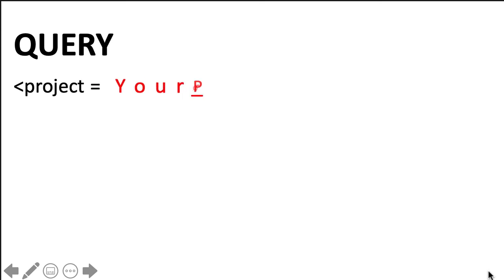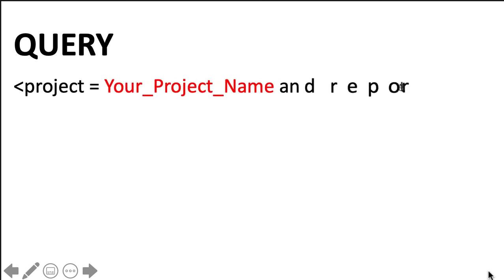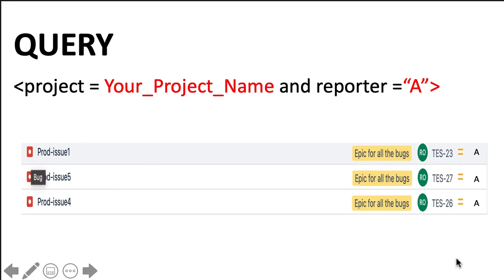Another option for him is to create a filter in Jira and get those three issues quickly. The query for such a filter could be project equals to your project name and reporter equals to A.